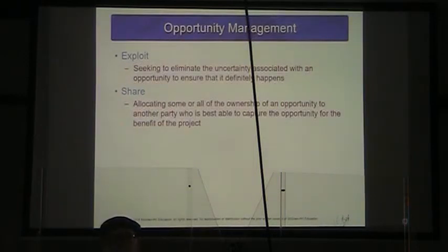We can share an opportunity. Give some or all of our ownership to somebody else who is best able to capture the opportunity for the benefit of a project, right? You know a friend of yours is looking for a vehicle, another friend of yours is selling a good, reliable vehicle. You tell your first friend, hey, listen, I know this guy, he's selling a vehicle here. It's really pretty much like what you want. Let me give you his phone number, right?